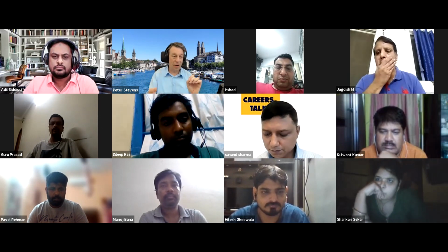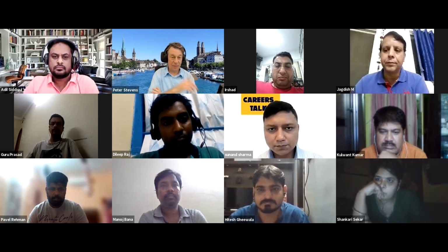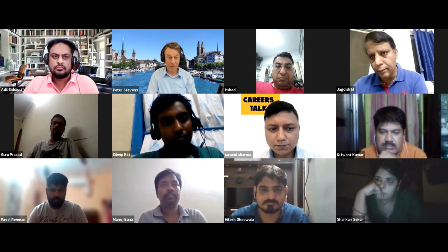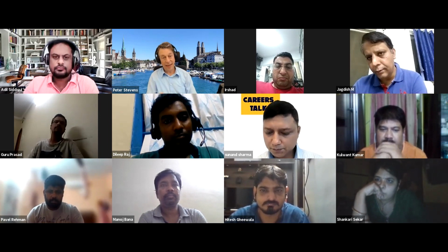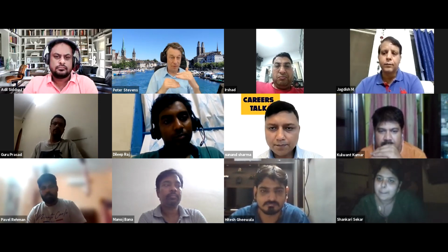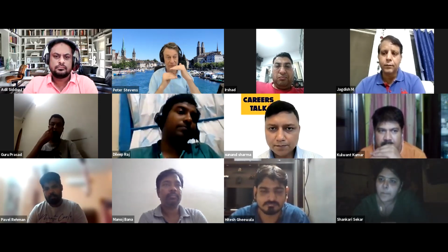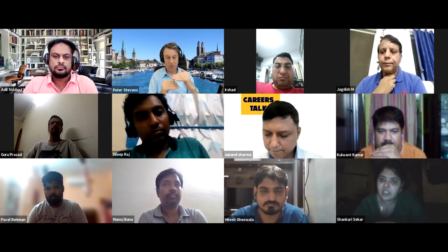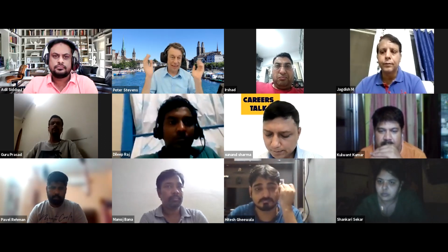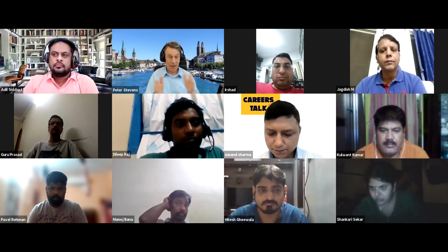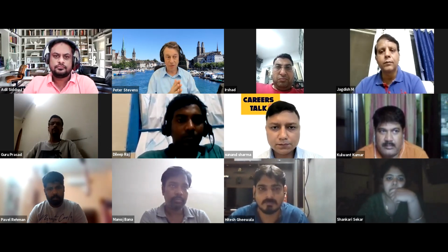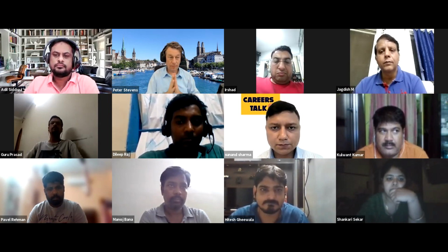If you deliver me garbage, that means we're going to spend a lot of time arguing about bugs. If you don't deliver me anything at all, I'm not going to believe in you. So as an agile team, it is much more important, even if you're only delivering 1 backlog item per sprint at the beginning, that you deliver something and it works, because your product owner can work with that. And then maybe as you get better, you'll be delivering 6, 8, 10, 12 backlog items per sprint. But it's that predictability, that you can trust me, that is the most important thing you need to do.